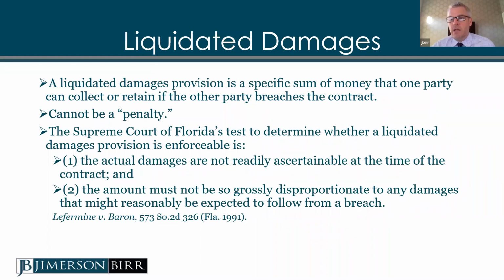So they try to figure out a reasonable number that they can put in there for their liquidated damages, so if the project isn't delivered on time, they can at least recover that. It may involve finance charges. If the project isn't finished, the loan isn't closed, what is that going to look like for the owner? You do the best you can to estimate what those damages are, but you've got to build some contingency in there, because you're not going to know everything at the time that you're contracting if the contractor in this example doesn't deliver the project on time.